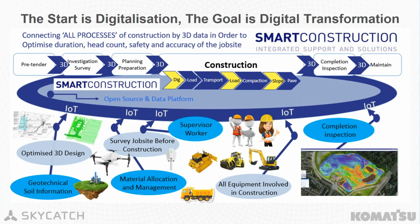What came next was the realisation that our new technology cannot be everywhere on the project at the same time, and the integration of Everyday Drone program was formulated to connect all job site information together in partnership with IMC technology. We're now using Everyday Drone from the beginning of the projects to collect whole site information from pre-tender and bidding capability, comparing against 3D design surfaces, providing fleet and project managers real, accurate information viewed in the smart construction application so that we can work out their cut and fill volumes with accuracy from the beginning, enabling the project tender teams to select the right machines for the project, optimizing fleet recommendation, and customizing the construction method, making right decisions from the start.